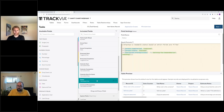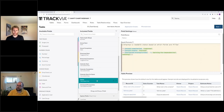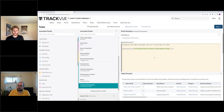I also created some extra calculated fields for status and unclear prerequisites to help with conditional formatting. The status field lets each task look at itself and generate a friendly text string — is it complete, started, or waiting for dependencies? This enables conditional formatting like 'if status equals waiting for dependencies, show it orange.' The unclear prerequisites field is a simple sum of whether prerequisite tasks have an actual completion date — rolling up ones and zeros.